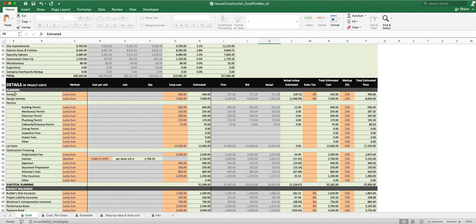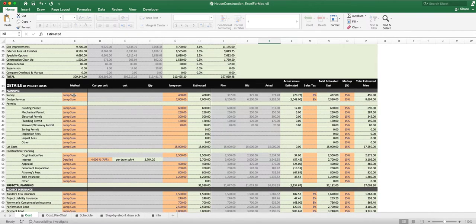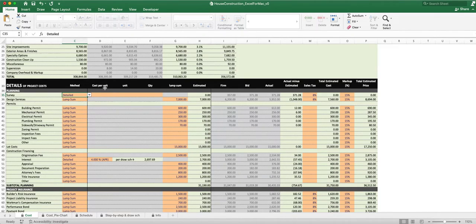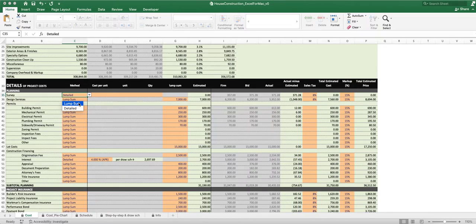In the planning phase, you've got things like surveys — maybe you're going to have a guy come out and survey your property lines. You can choose to put that as a lump sum, which you probably want to do for the survey. If for some reason you want to do a cost per unit — maybe you've got a business where a contractor does a bunch of stuff for you and gives you a price of, say, $250 per unit — you'd put the quantity in. But for simplicity, we'll leave it as a lump sum.